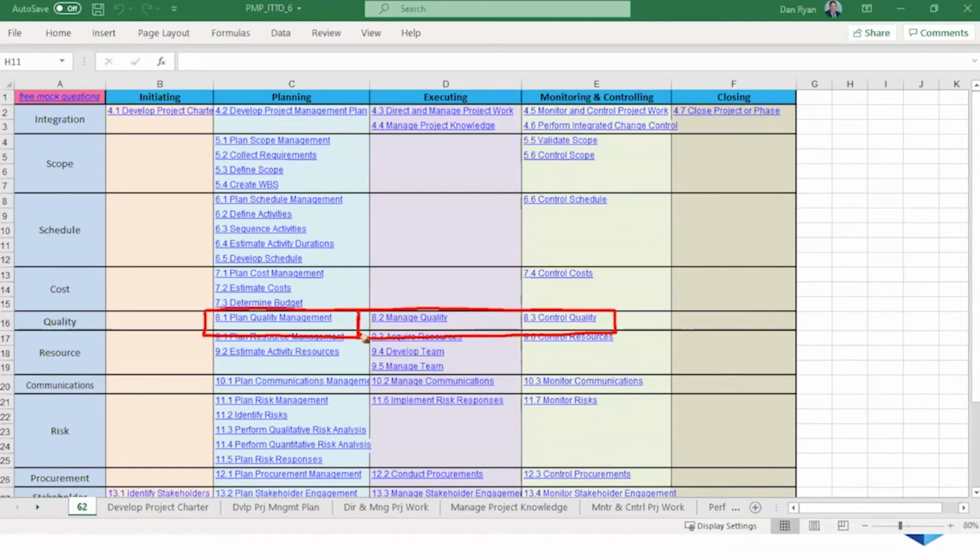But we know that one major tenet of quality is that quality is planned in, right? So anything requiring a lead time, anything training, hiring of people, the ordering of certain equipment to do the job, all that stuff has to be planned in real early. And certainly you would need to consider all the lead times. All right, and so quality is planned in, and that is also a principle of total quality management, TQM. All right, so for the exam, I want you to know quality is planned in.